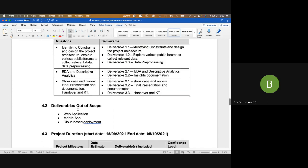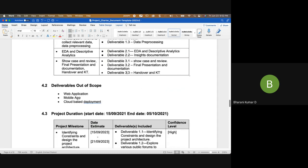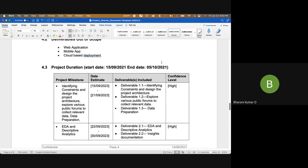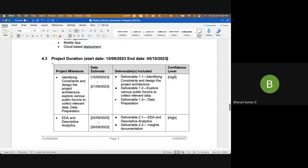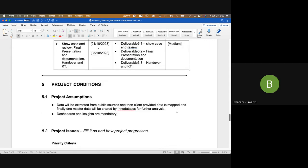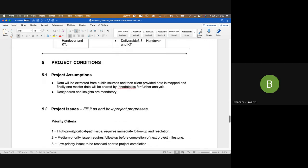You also need to mention what is out of scope: for example, you need not build a web application or a mobile application, and you need not do cloud-based deployment. In the project duration section, mention the start date and end date. For each deliverable, mention how confident you are about meeting the timelines — medium or low — and what risks you foresee. Assumptions include: data will be extracted from public sources, client-provided data will be mapped to produce one master dataset.